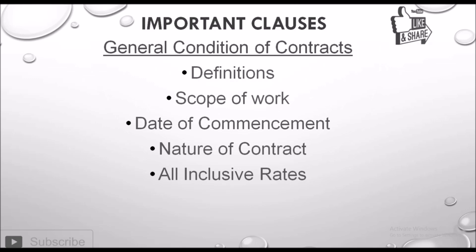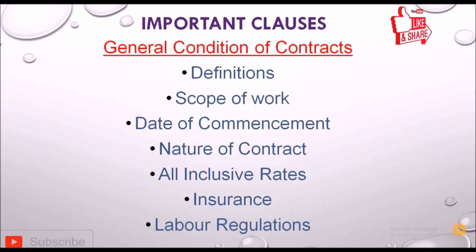The nature of contract defines whether it is a lump sum contract or a cost-plus contract. Next is all-inclusive rates — we define whether the rates are inclusive or exclusive of taxes. Next is insurance: the contractor will provide all-risk policies and any other insurance required. We define who is responsible for insurance — whether it is the contractor or the client.